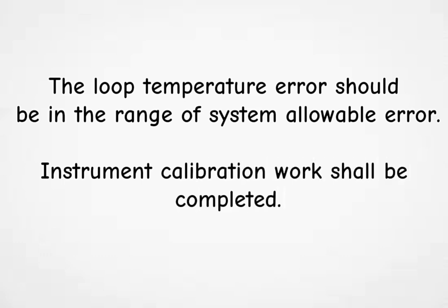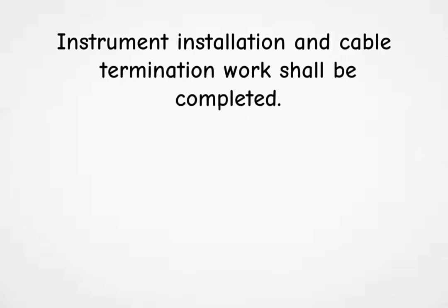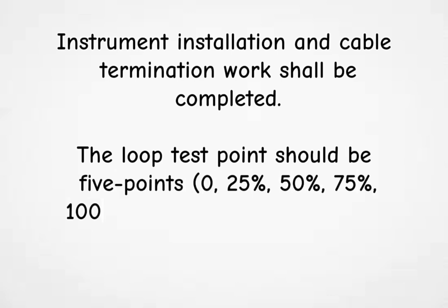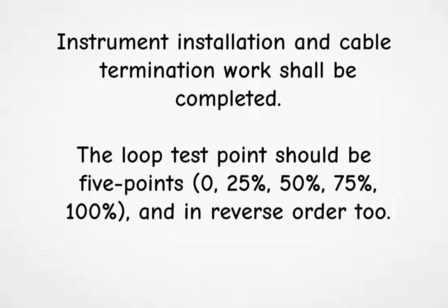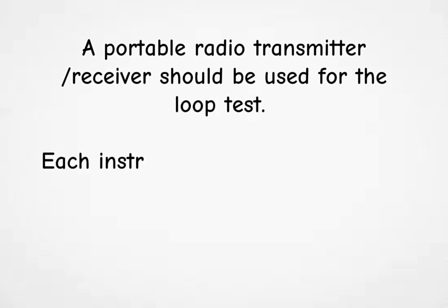Instrument calibration work shall be completed. Instrument installation and cable termination work shall be completed. The loop test points should be 0%, 25%, 50%, 75%, 100%, and in reverse order too. A portable radio transmitter and receiver should be used for the loop test.